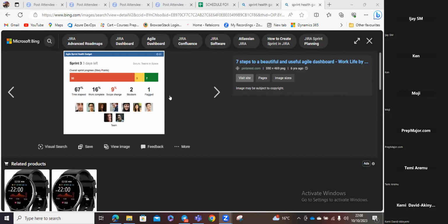You can do a trade. You told me to do ABC. Now you're bringing D, telling me D is more important than anything. So according to priority of ABC, B has the lowest priority, for example. So can I take out B and do it next sprint? Or if we finish it on time, we can still do it this sprint. But note that we'll put B in kind of a parking lot and we'll take in your D to become the #1 priority of the day. I don't know if my English is very clear. So that's a trade by barter too.